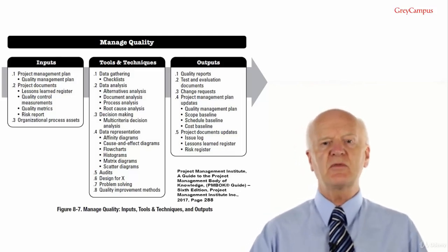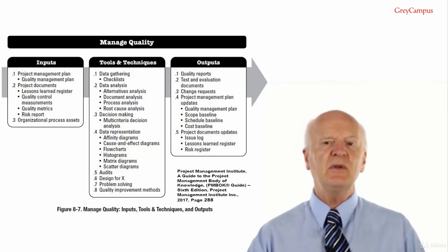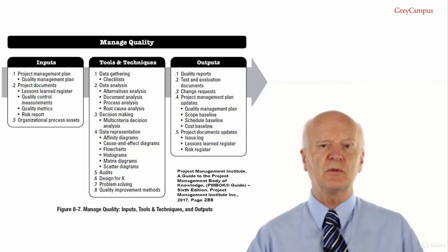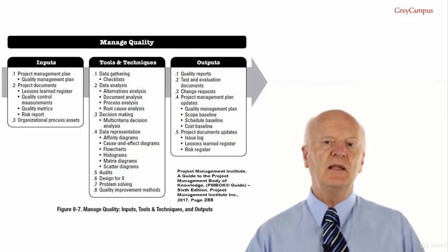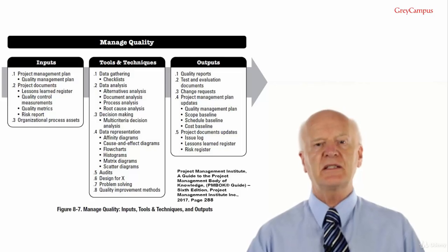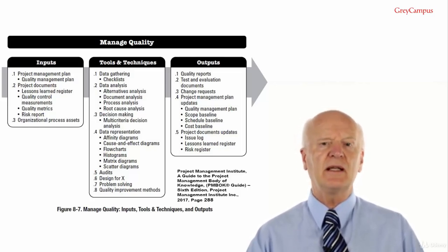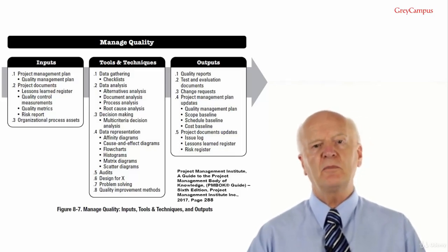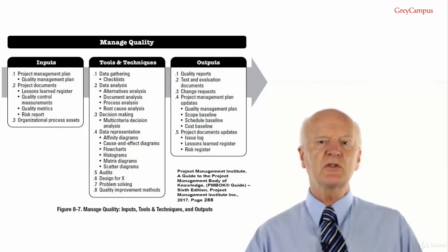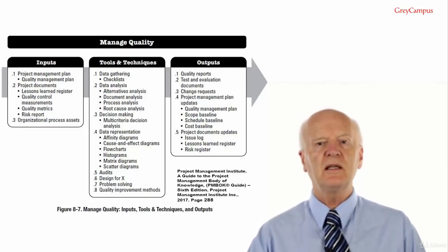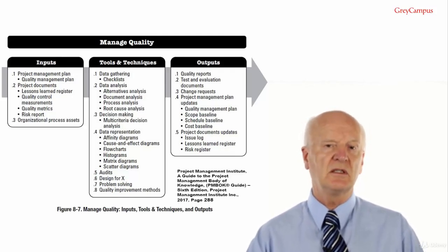Problems can arise as a result of the quality control processes or from quality audits and can be associated with the process or deliverable. Using a structured problem-solving method will help eliminate the problem and develop a long-lasting solution. Problem-solving methods generally include the following elements: defining a problem, identifying the root cause, generating possible solutions, choosing the best solution, implementing the solution, and verifying solution effectiveness.